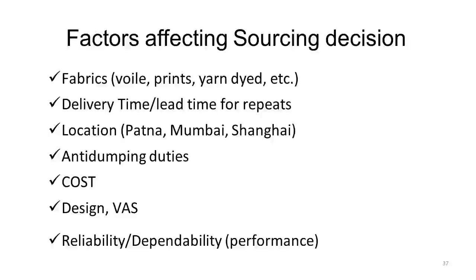And if you look at delivery time or lead time for repeats, now remember, delivery time is when I'm placing the order for the first time. How much time will you take? The guy says 30 days. I say, if I give you the repeat orders, how much time? The guy says 30 days. So why 30 days? I'm placing the order for the first time, so there's going to be a lot of approvals and things like that. And after the approvals have been made, then you will start manufacturing. So therefore, you might require 30 days.